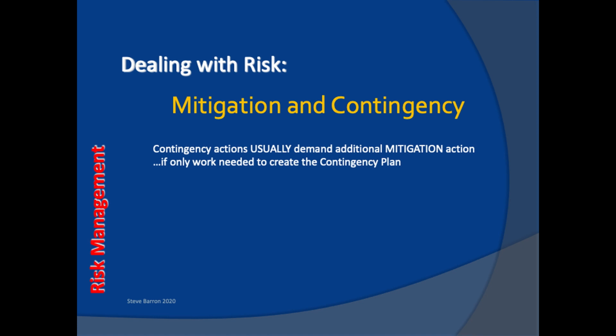If we wait until after the original contractor defaults on the contract, our position will be more desperate, potentially resulting in less favorable pricing and deliveries. As contingency plans relate to providing alternative approaches, they are often called Plan B.